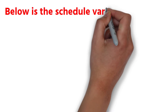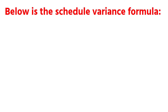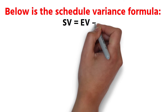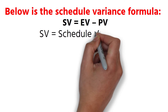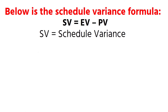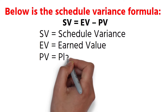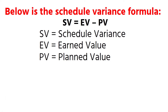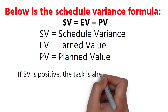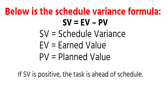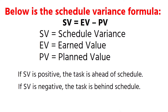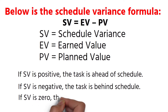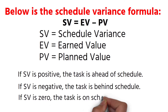Below is the Schedule Variance formula. SV = EV − PV. SV equals Schedule Variance. EV equals Earned Value. PV equals Planned Value. If SV is positive, the task is ahead of schedule. If SV is negative, the task is behind schedule. If SV is 0, the task is on schedule.